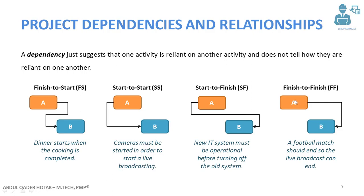The last type of relationship is Finish-to-Finish, where the predecessor activity must finish in order to consider the successor activity as completed. For example, a football match should end so the live broadcast can end — as long as the match continues, the live broadcasting continues.